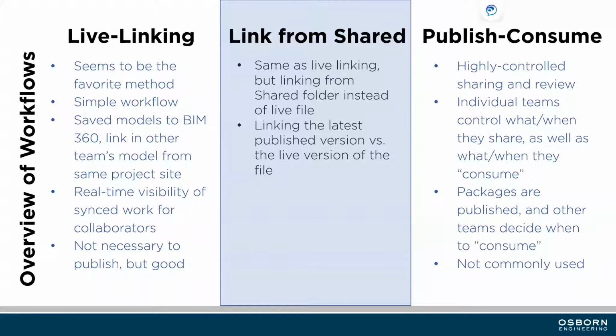You save your Revit file to that folder, and then other teams save their working Revit files in there, and then you just link yours to theirs. Every time they sync and you reload the latest, you're seeing their working files. It's not necessary to publish, but it's a good idea because that allows these tools, the markups, the compare, the issue tracking, that allows non-Revit users to get in there and, I guess, add their 2 cents.